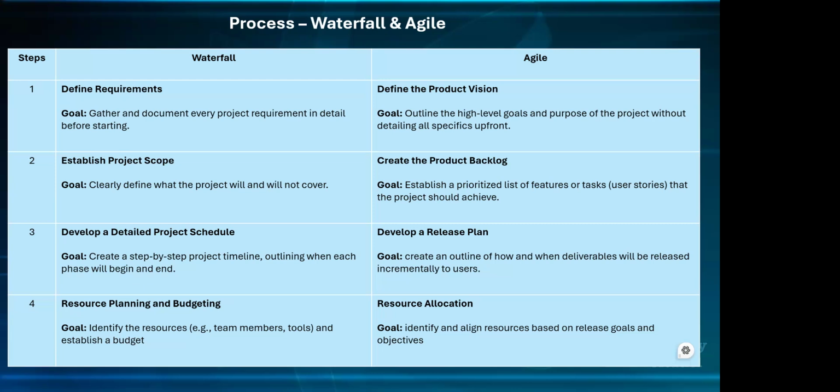For example, we're still looking at the same example, the online website for a bookstore. The things that might be in scope will include everything I've made mention of: a user login, search functionality, being able to click on the book, having a catalog. What will be out of scope at the initial stage might be a mobile app.